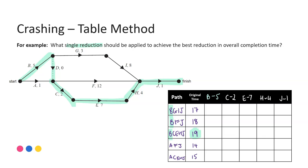Everywhere there's a B, I'm going to subtract 5. From the first path, 5 off 17 brings it down to 12. 5 from 18 comes down to 13. 5 from 19 comes down to 14. There's no B in AFJ, so it stays at 14. And no B in the final path, so that stays at 15. Our critical path will be the longest time. Comparing to the original, if I was to reduce activity B, I could save 4.